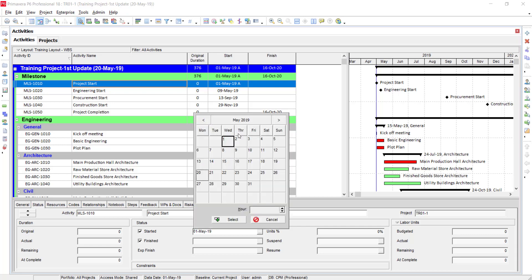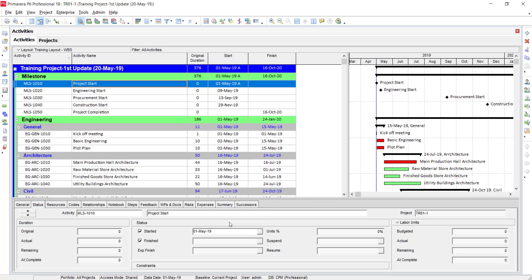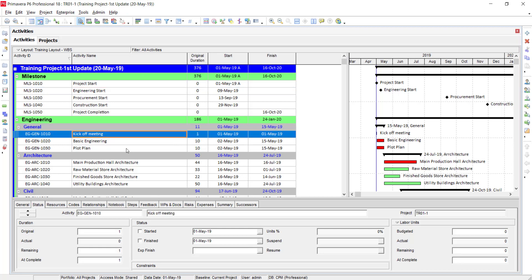Click Started and change the date. We are assuming that our project started on 1st May as planned, so I am going to leave it as is — no need to change. Once I select the Started status, Finish is automatically checked because this is a zero-duration milestone, so it will automatically finish on the same day. Now going to the first activity, the Kickoff Meeting — select it, set status to Started, and assume it is also finished on the same day.